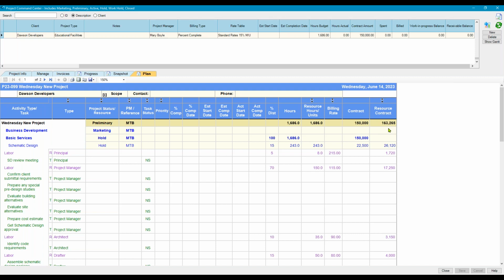And if you happen to work in a firm where maybe principals or marketing develop fees and those fees are passed on to the project manager, this plan report is a great tool for the PM to sit down with whomever developed the fee and walk through this, because that's their opportunity to say, I don't think I can deliver within what you budgeted, or to get a further deeper understanding from the person who budgeted, saying, okay, but you're overcomplicating the scope, or you're overcomplicating something, and then that would be our opportunity to edit these hours.